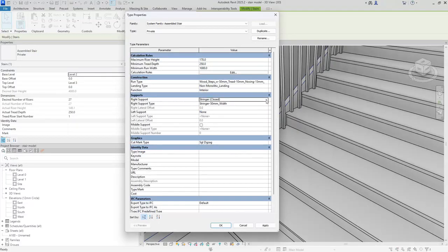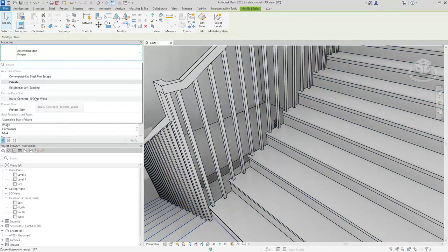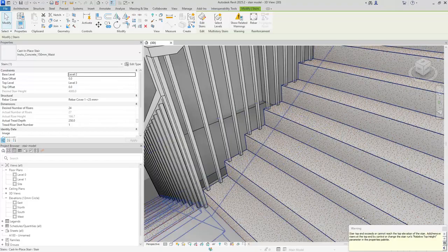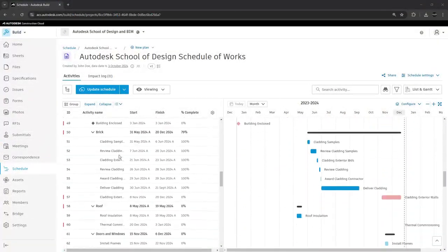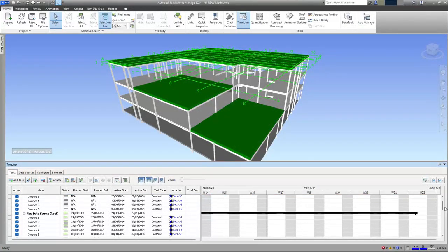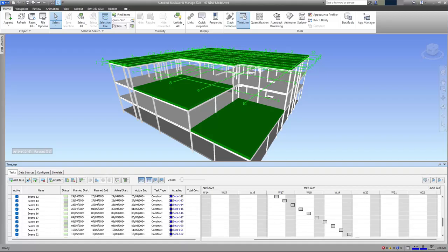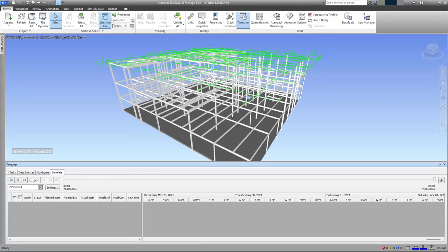The construction phase relies heavily on the collaboration between on-site and office-based teams. Real-time updates are essential to maintaining alignment with the program plan. 3D point cloud scans of the progress on site, as well as other tools used by the design team to plan the program schedule, can visualize the construction progress and identify potential bottlenecks in the construction phase and ensure important milestones or dates that work packages must be completed by are met.